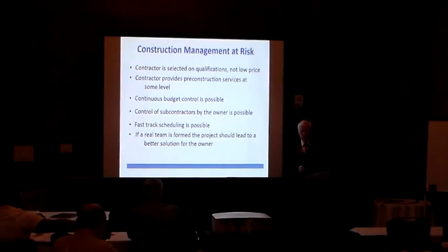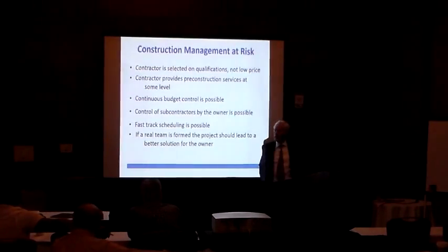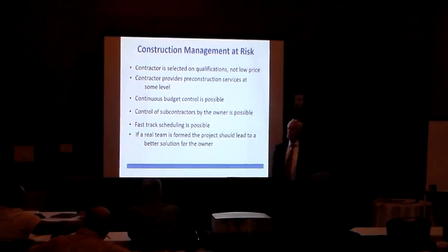I know in our company we will give a budget at the napkin stage and follow that budget all the way through. And the main thing that changes is the contingency gets smaller and smaller as we go along the way. Yes, that's also true of the other method, as long as you're using the estimating process. In hard bid,